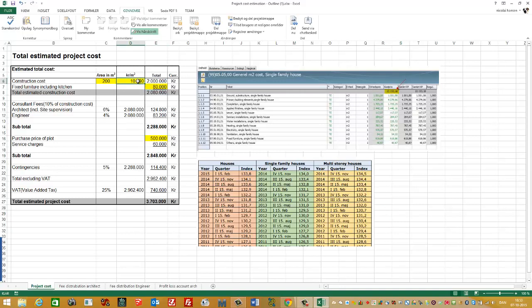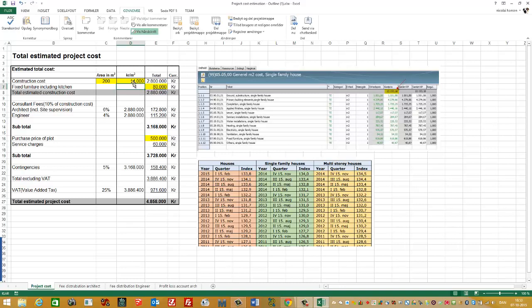Now I'll just put in an approximately square meter price, 14,000 Kroner per square meter. You need to put in your precise value.